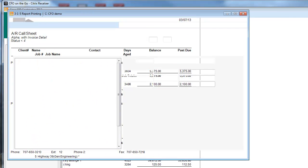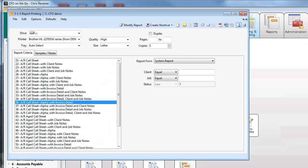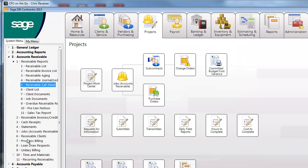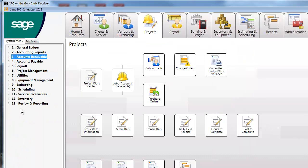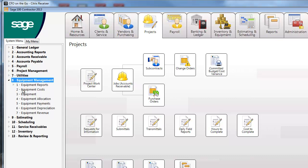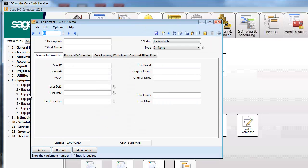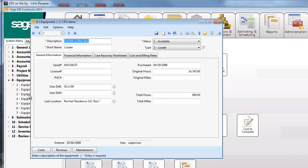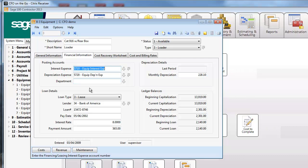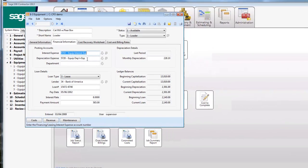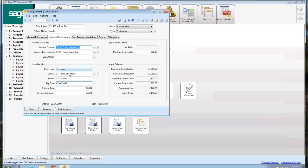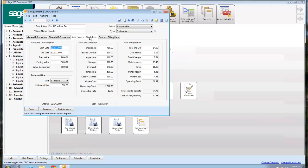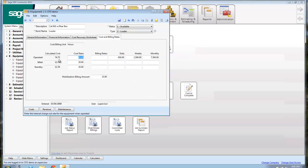I'm going to jump into equipment real quick because I'm running out of time. Because I like to keep these short because you're busy. But so on equipment, when we set up a piece of equipment in here, and I think I have one set up that has a lot of information. So this is a little loader. It's available. It's a classification of a loader, but we put a lot of information in here. Where I want my interest expense, where depreciation expense goes. If it's a lease, who am I making my payment to so it'll schedule those out. This takes a little time to do, but a lot of people shoot from the hip for the first year until they get some data. But this allows you to calculate out what your rental rate should be based on the utilization hours that you anticipate for the next year. And knowing the cost of the ownership and the cost of operation. And then I come up with billing rates. And so we have three rates. Actually, those are the cost. So when it's working, we charge the job $85 an hour. When it's idle or on standby, we charge them $20 an hour. And if it's mobilization billing, it's $15.